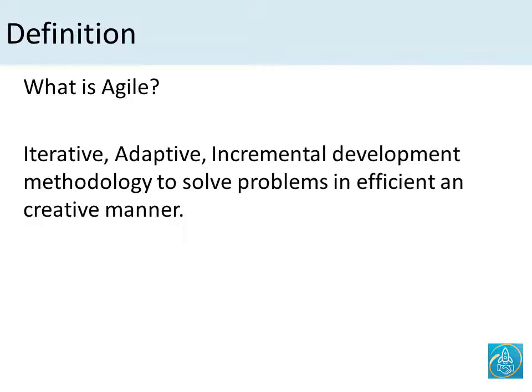And in shorter release cycles, a week to 2 weeks, you can pick a task and work on all the different aspects of it: development, testing, release. That allows you to release faster, show the product to the customers, and improve upon the product, addressing all the shortcomings that you typically associate with the waterfall methodology.